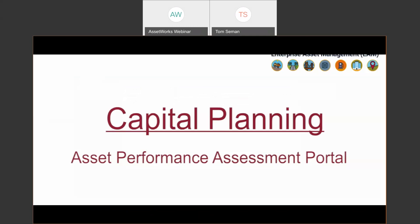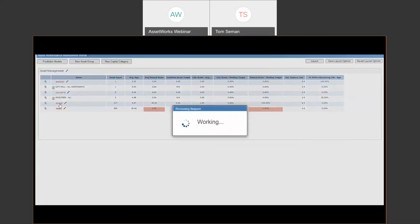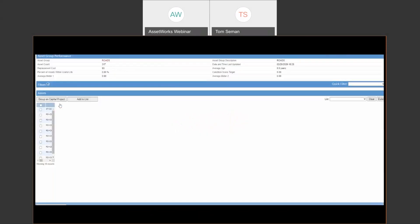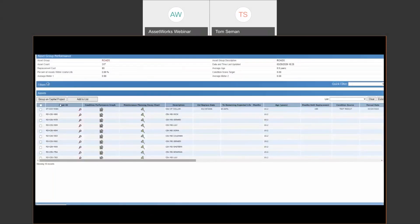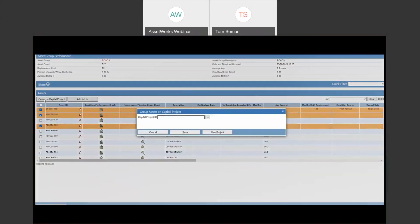Assets can be added through our performance assessment portal as well. So with the asset performance assessment module, you can group assets as you require or as you predefined. And then assets that have reached their minimum condition or performance score can be selected and then ultimately added to a project that would then fall under a capital plan.